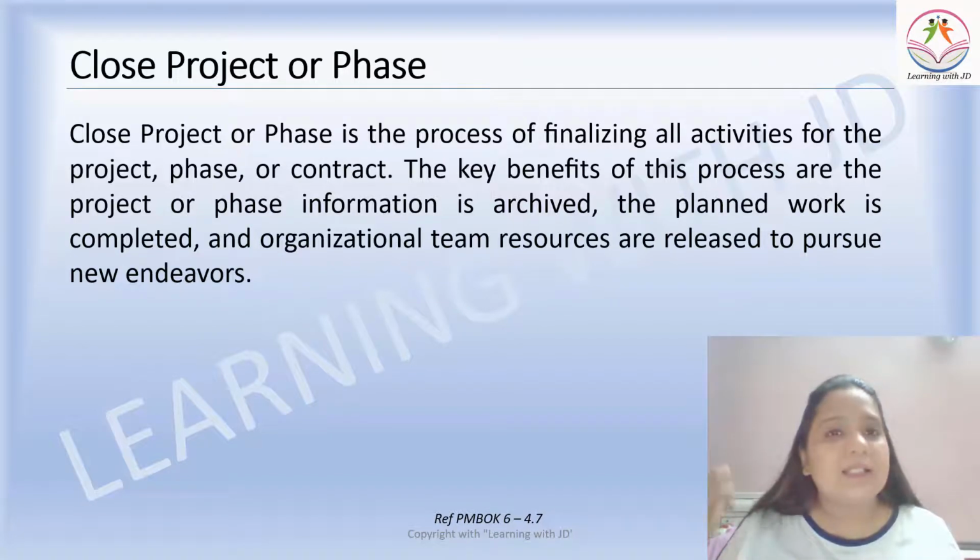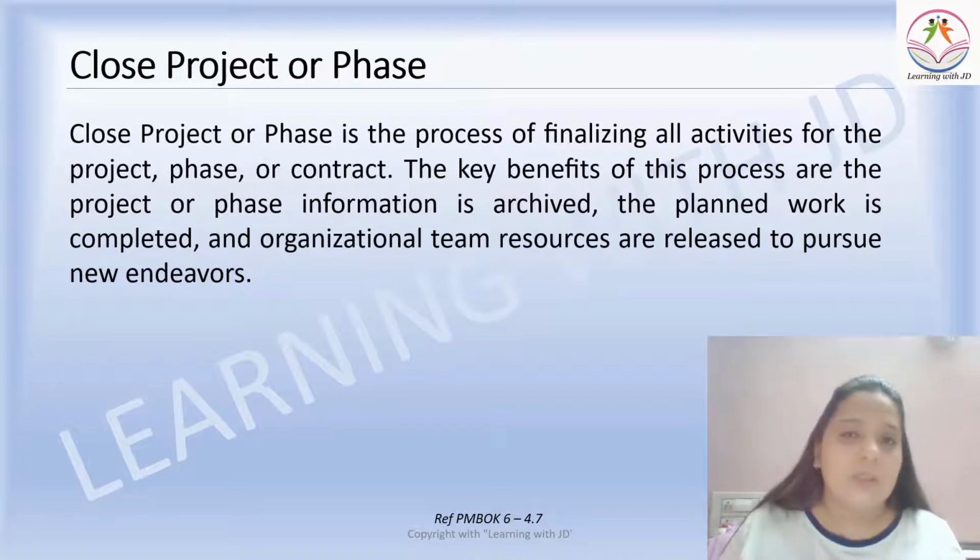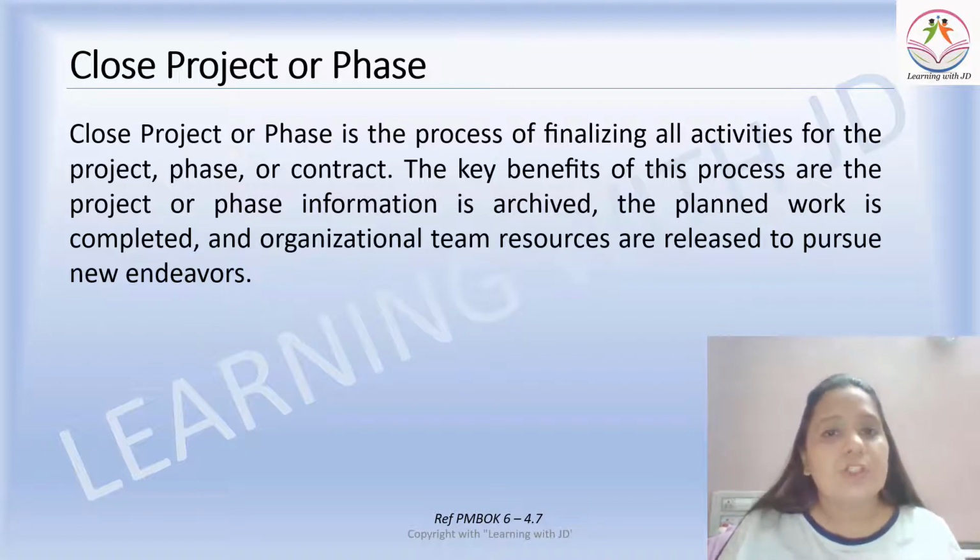Remember, all the activities have to be closed before starting this process. It cannot happen that some of the processes are open, for example procurement or any agreement is open, and you still go ahead and close the project. No, that is not possible. So close project or phase is the process of finalizing all the activities for the project, phase or contract.